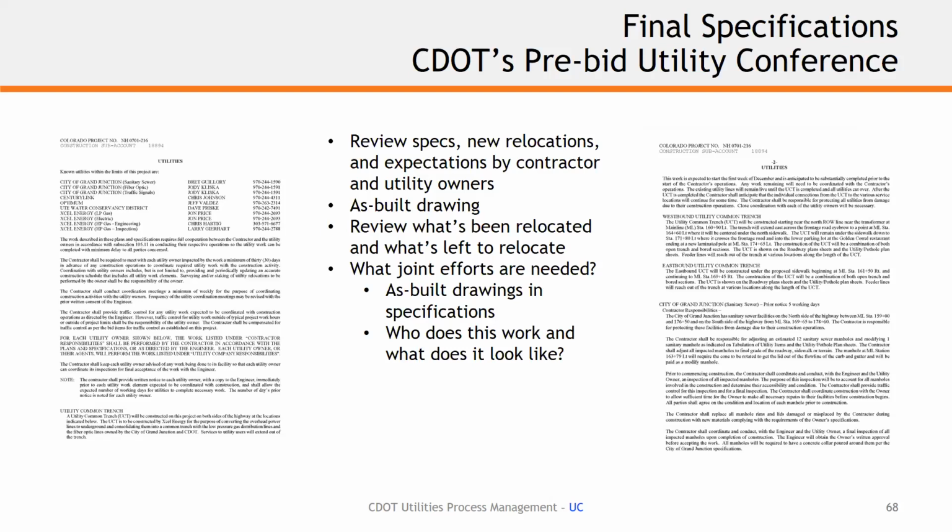It's not always going to be this situation where you can move everything early. More often than not, it's going to be construction-related relocations during construction. And right now, we had some utilities move pre-bid. We're in the process of moving utilities right now pre-construction, and then there'll be more utilities moved by our contractor during construction. So the relocations are falling all along this time frame. Pre-bid, which I think is ideal, but more likely, it seems, even after all the coordination, the responsiveness of the utility contractors coming in when they know they absolutely have to do it pre-construction, and then our contractor reaping the gains of that, although it's seemingly in the 11th hour. Yeah, absolutely.